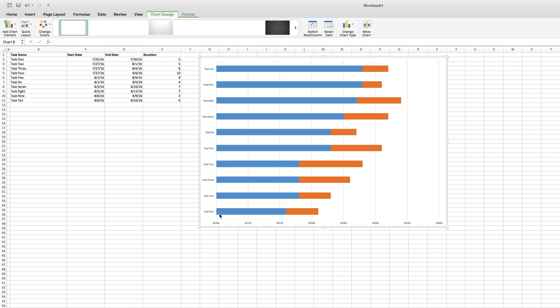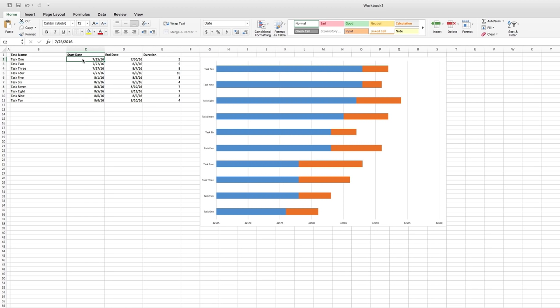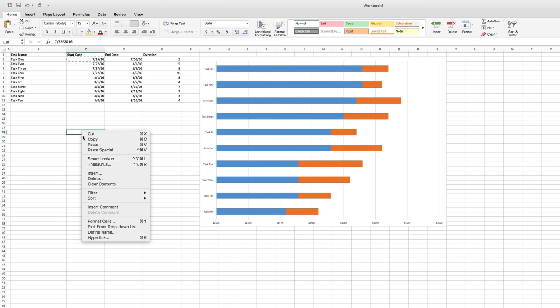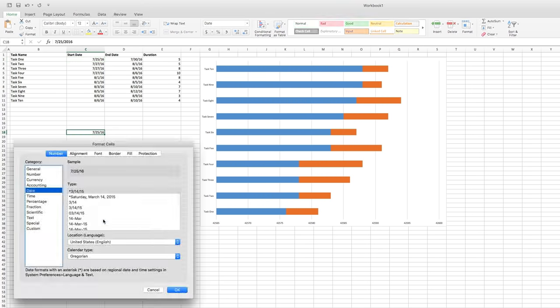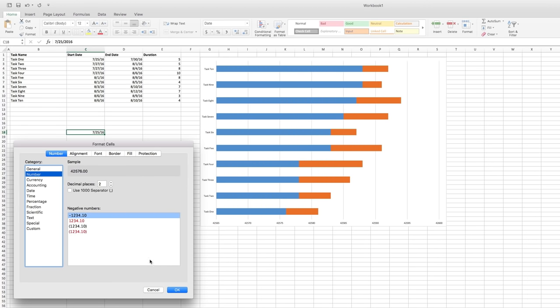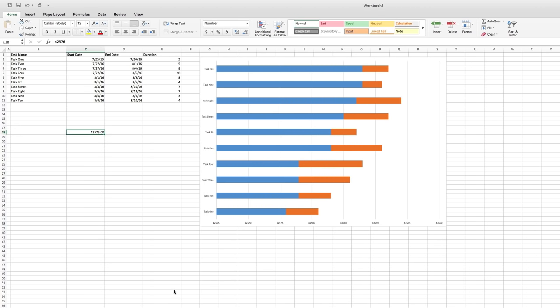Let's get rid of that extra time first. The first task in the project starts on 7-25-16, so there's no need for our project to show anything before then. Let's copy 7-25-16 into a cell down here and format that cell as a number rather than a date. Excel stores dates as numbers and you can see that 7-25-16 translates to 42576.00.